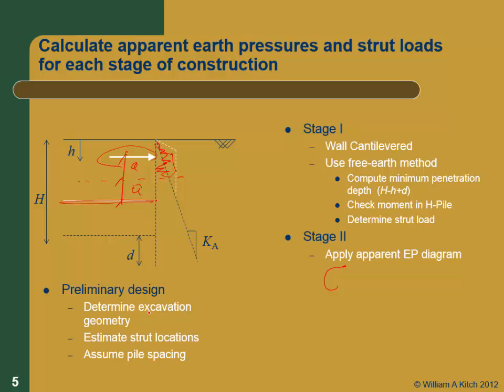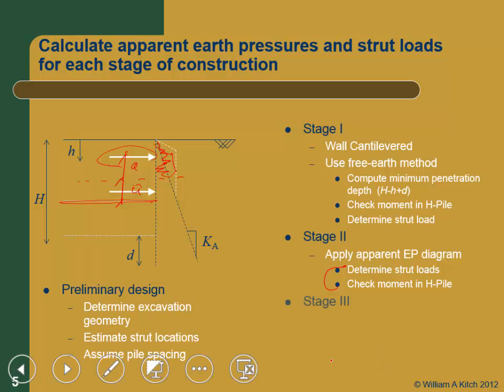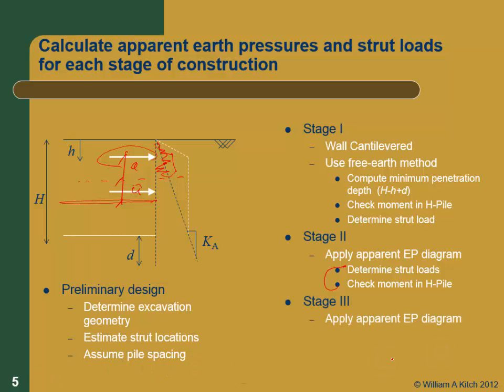So make sure you check every construction sequence. You can't wish those struts in. You've got to excavate. It's going to take time. You're going to put all the lagging up. Then you're going to put the strut in. Check your moments. Determine the strut loads. You go on to the next stage.